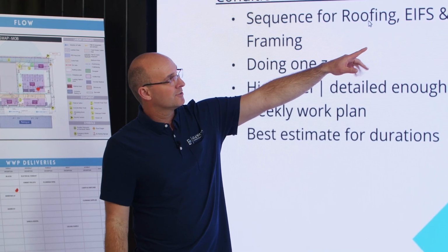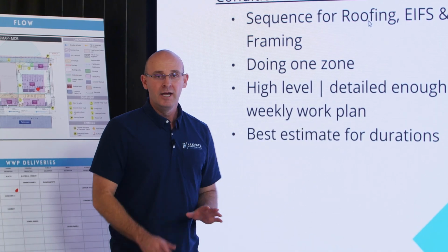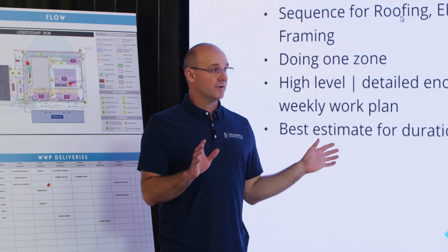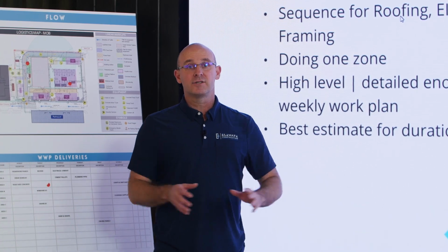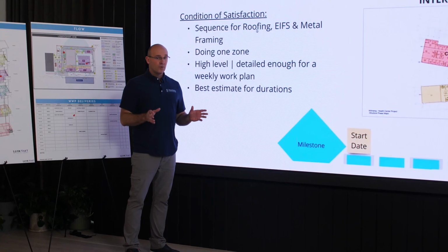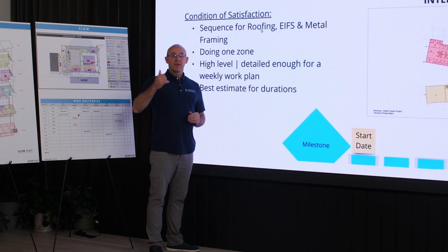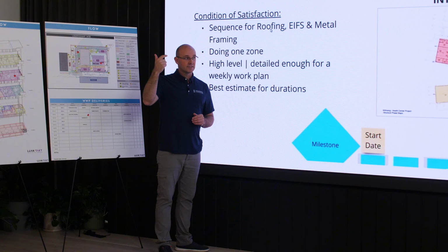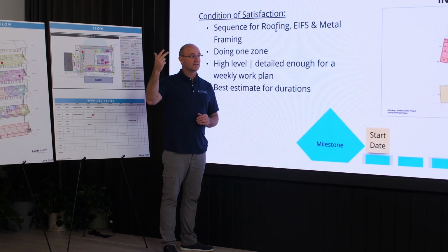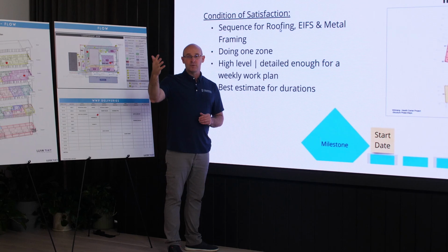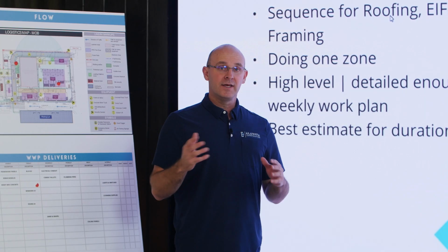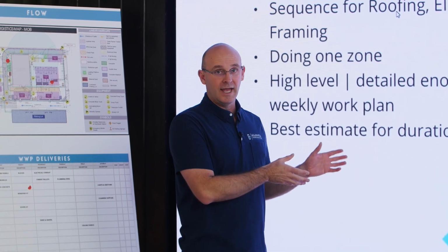That is me, and it was around Christmas time, but this is a real pull plan with trade partners who had never done this before. And I didn't do it perfectly. But it was effective. And I'm going to talk to you about how to do the pull plan. Before this pull plan video, we had sent homework, meaning these are the milestones, this is the pull plan, these are the conditions of satisfaction, this is where it's happening, and this is what we would like to have prepared. Please come prepared with your stickies for this type of zone size. Then they all come, and this was virtual and digital.